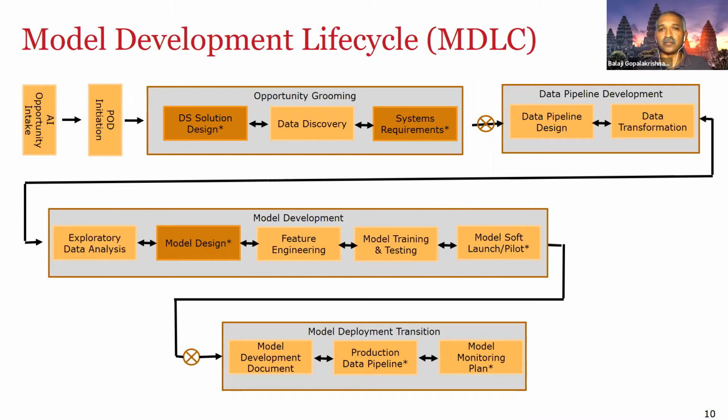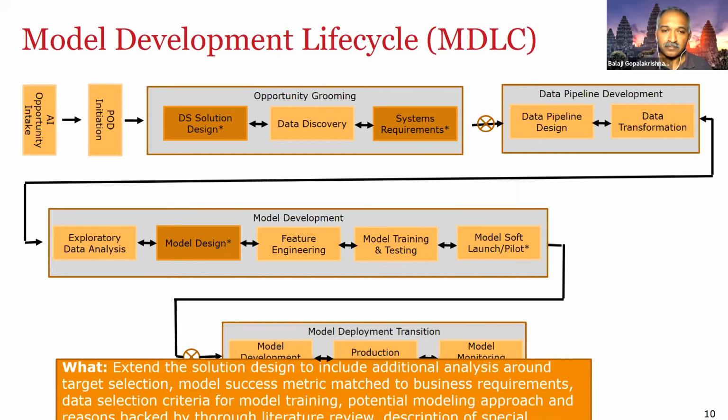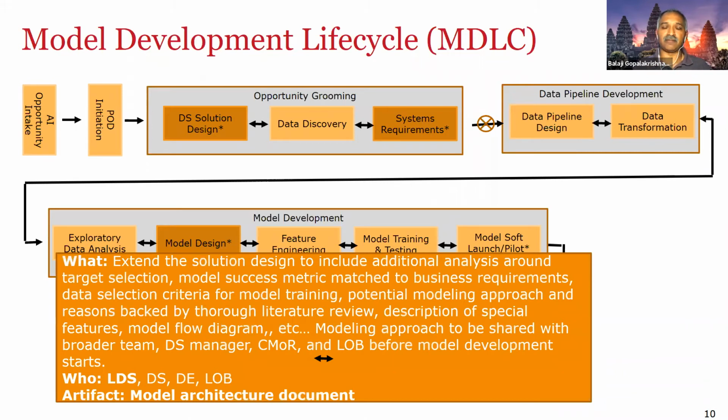You can have maybe one data scientist focus on the signature fraud, and the other people can try to scrape some images, scrape some additional information on the amount and all the other aspects of the check, and build that model, and then they can combine these things together. But if you don't do that planning or design, then again, you can run into some nasty surprises later, where you would wish that you had actually done this before, okay?